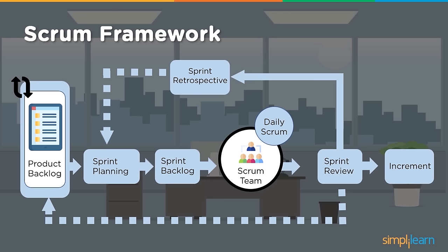If you look at from sprint review, you have a retrospective to check what is planned versus what is being delivered. At the same time, the review points will come and get updated to the product backlog as well, to the product owner. So product owner should be aware what is delivered, what is pending to be delivered, and that increment is further delivered. So these increments, what is delivered to production, what is deployed in the production, should have value. That integration which happens, all the increments coming together, provides the fulfillment of the requirement as well as creating the value that is required.